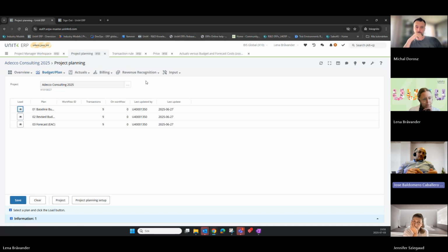What is the main problem? Or one of the problems, we don't have project planning tools. So if you go to a project life cycle, when the project manager receives this, you will start sketching tasks. So I will need to do this task, this task, this task, this task. And then you can also add effort to this task. I know for this task, I will need 20 hours. For this task, you will need 500 hours, for example, no? And then you can create just a preliminary budget by this. I don't know, you can put a number for the costing that this will have. You don't need to have very special, because it will be a very initial analysis, no?